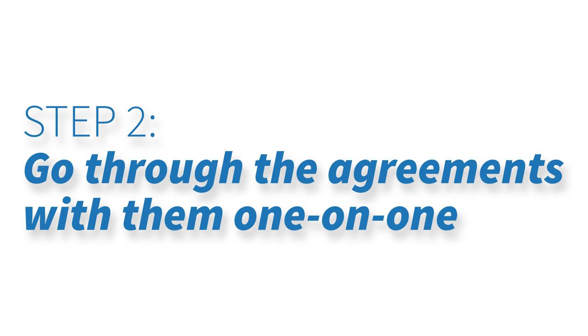Step two: go through these agreements, proposals, terms and conditions with the client one-on-one — on the phone, on Zoom, or in person. This will help you stay out of that endless loop of revisions and keep you from losing clients. Not doing this face-to-face costs you business. For example, with hosting when we build websites, clients have said 'I didn't know I had to pay for hosting.' Just because something is common sense to you doesn't mean your customer understands. Slow down your process, charge more, and bring more value by giving them a deeper understanding of how everything will work.